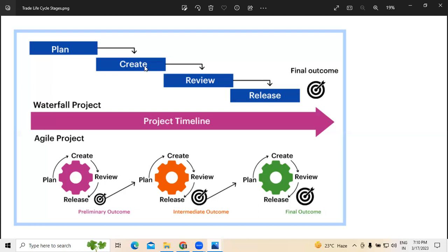For example, sprint planning is for 2 weeks, where some requirements were given by the customer. Over a period of time, we came to know that there are some changes to be made to the existing ones. What do we do? We don't want to deviate from the goal of the sprint. The sprint goal should not get deviated. So in spite of it, we simply transfer the rest of our things to the next sprint. Implementation will take place in the next sprint.